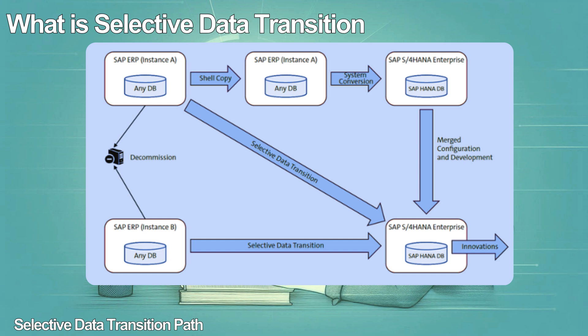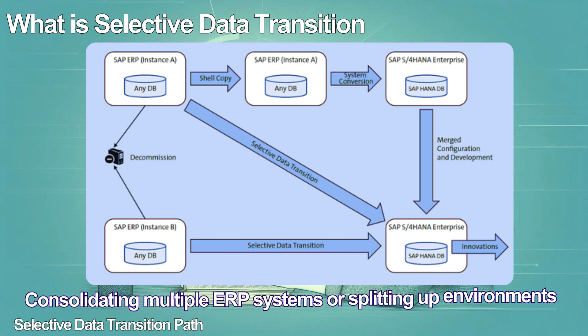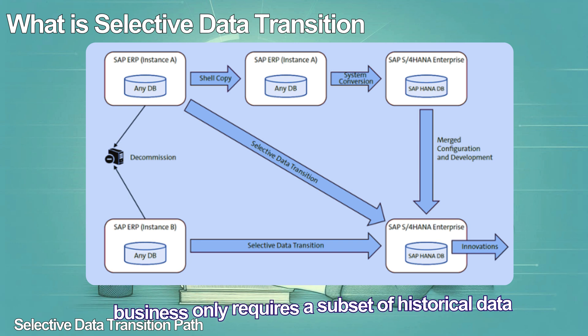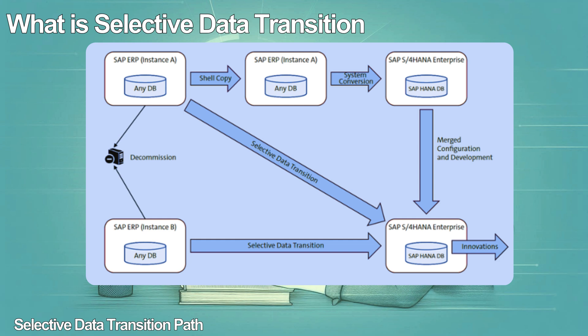You should consider selective data transition if you need a phased go-live instead of a big bang cutover, you're consolidating multiple ERP systems or splitting up environments, your business only requires a subset of historical data, or you're looking to preserve stable processes while innovating others. It's ideal for organizations navigating complex operational landscapes or undergoing strategic changes like mergers, acquisitions, or leadership shifts.